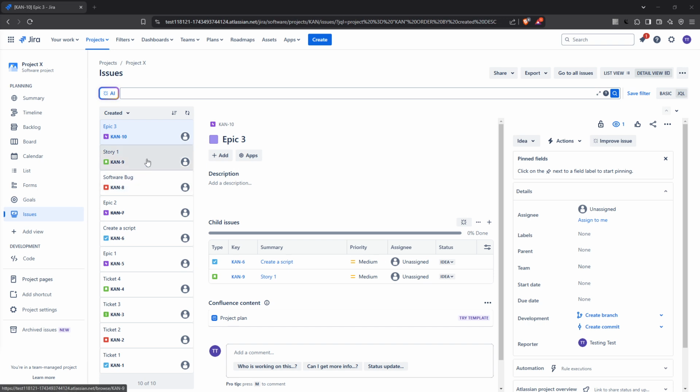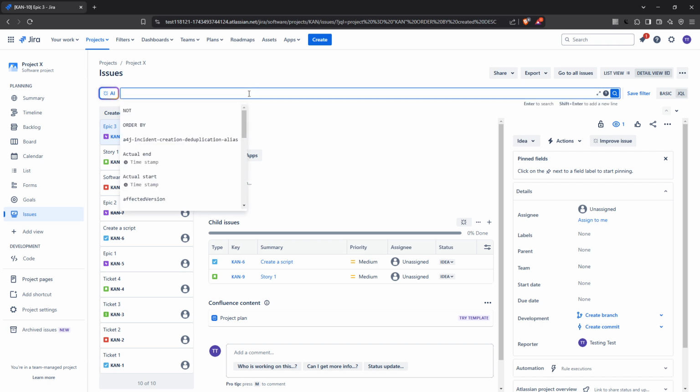When we talk about retrieving Jira tickets from months ago, we're essentially tapping into the power of JQL, or Jira Query Language. This tool allows users to search for issues within your Jira projects with great precision. To achieve our goal, we can use the created field alongside relative date operators such as 1M for 1 month ago, or 3M if you're looking for something created 3 months ago.